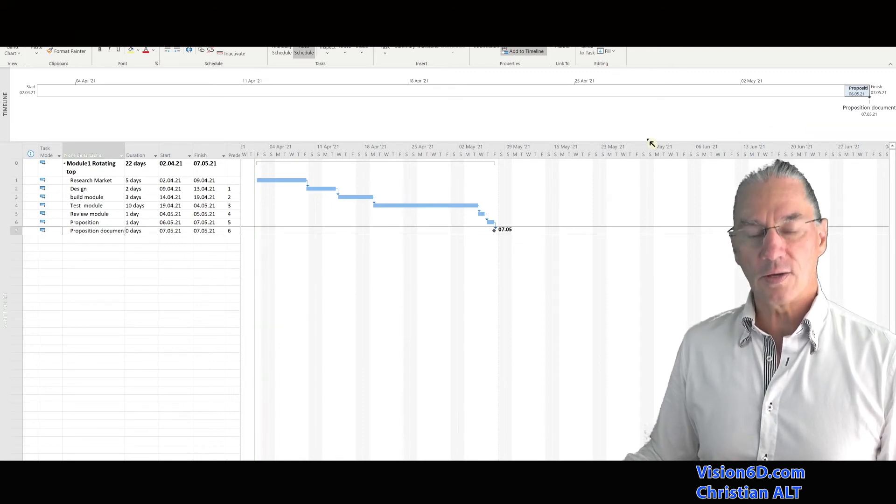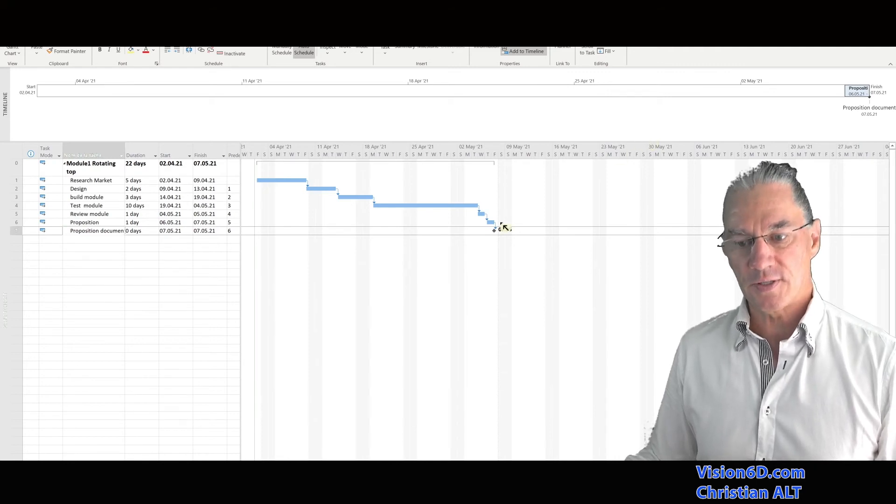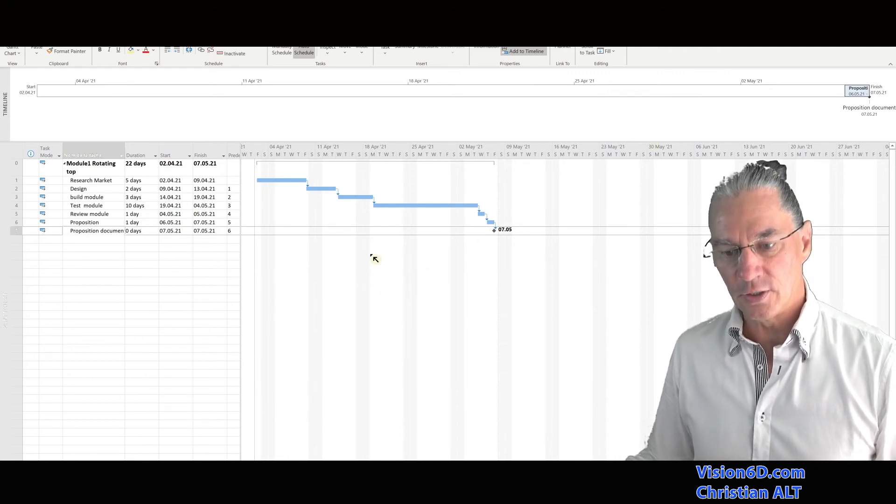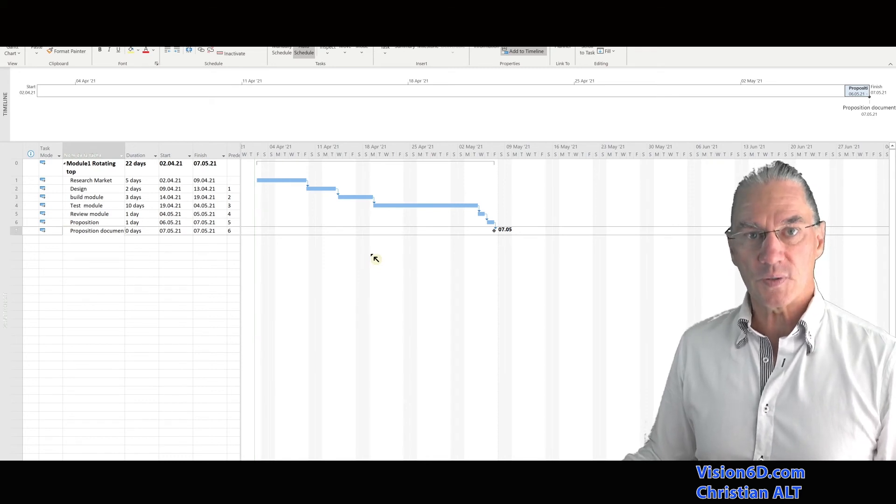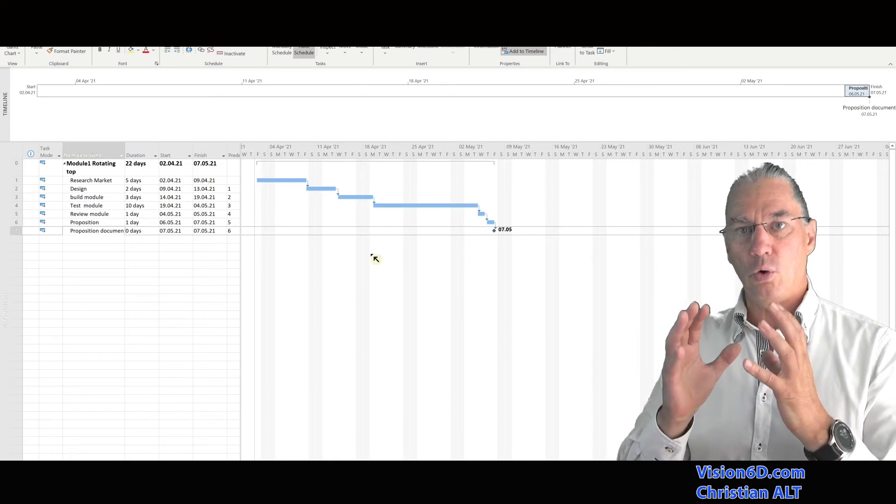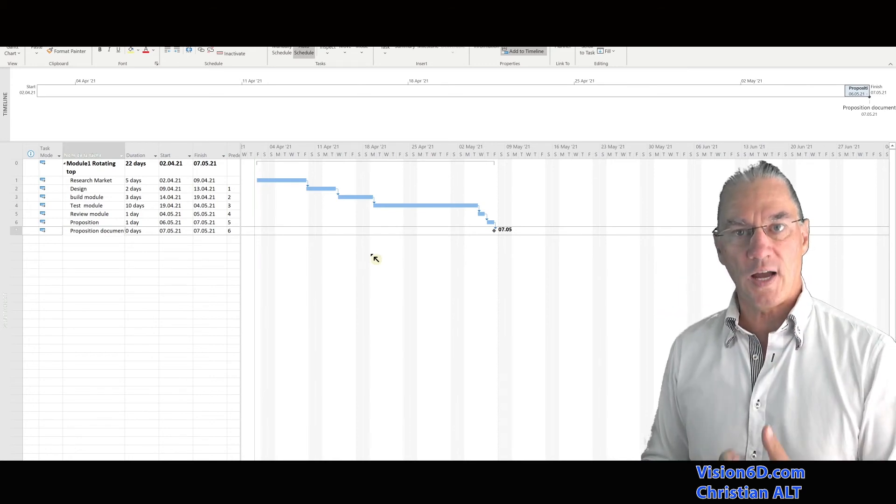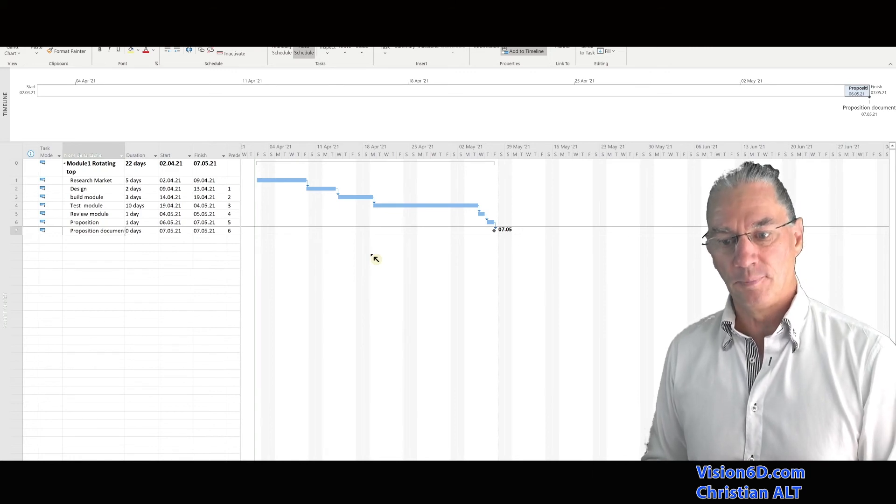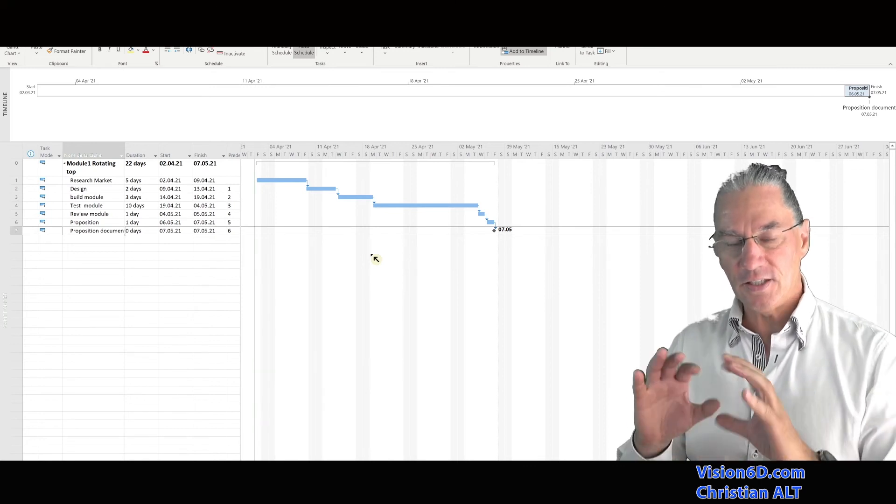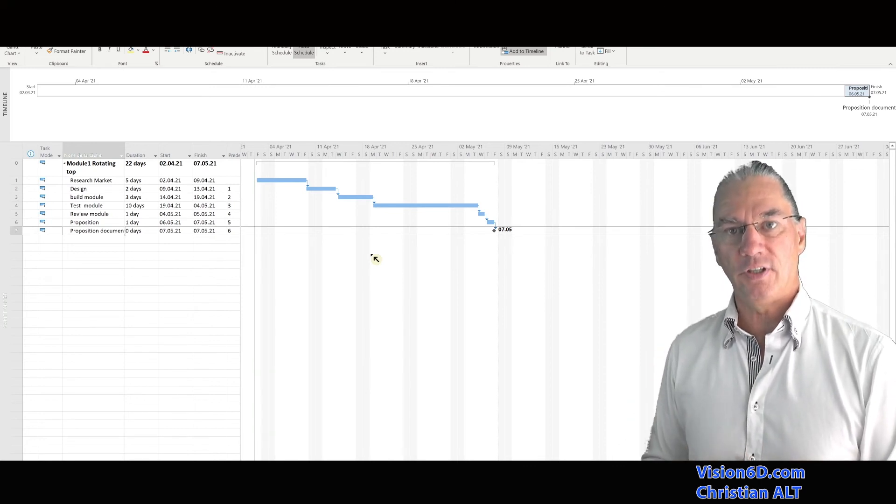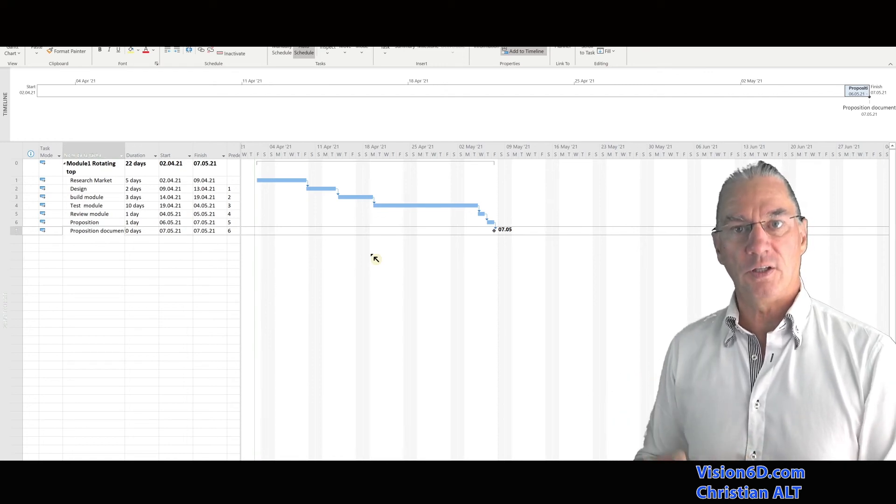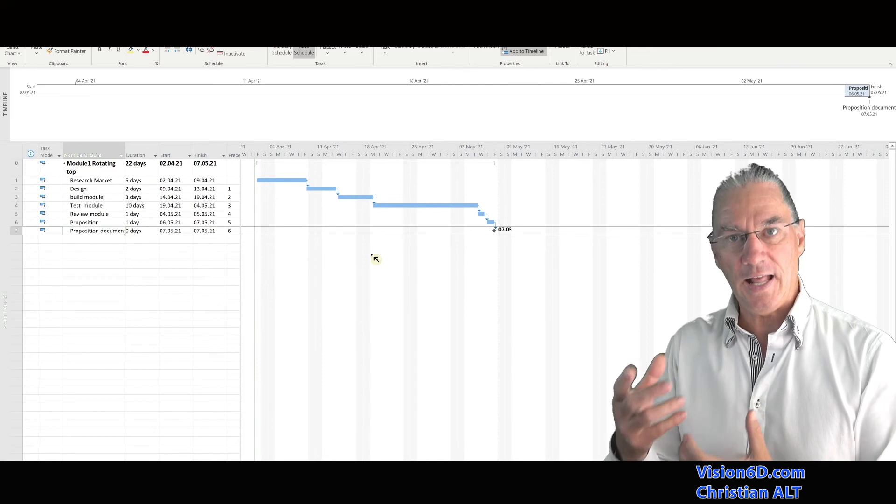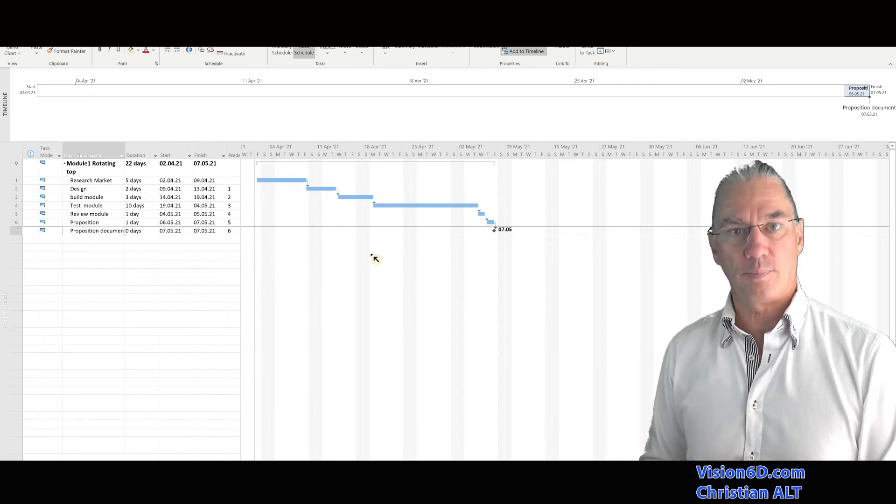So with this, we see that we have two different timelines. And the timeline here is really the one from the sub-project. This is interesting because you can give a global overview of the global project from the timeline into the master file. And here for each module, you can have their own timeline where you can show specific events or specific elements you want to communicate on that sub-project.